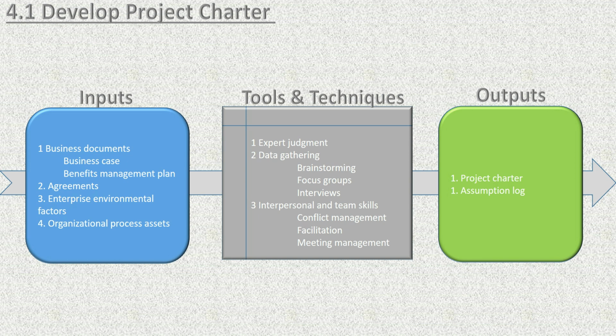Many of the information will not be readily available at that point of time. So what we have to do as a project sponsor and the project manager or any other person who is involved in this developing process, we need to assume a few things. Okay? We need to assume a few things, and whatever assumptions are made, we have to document in our assumption log.